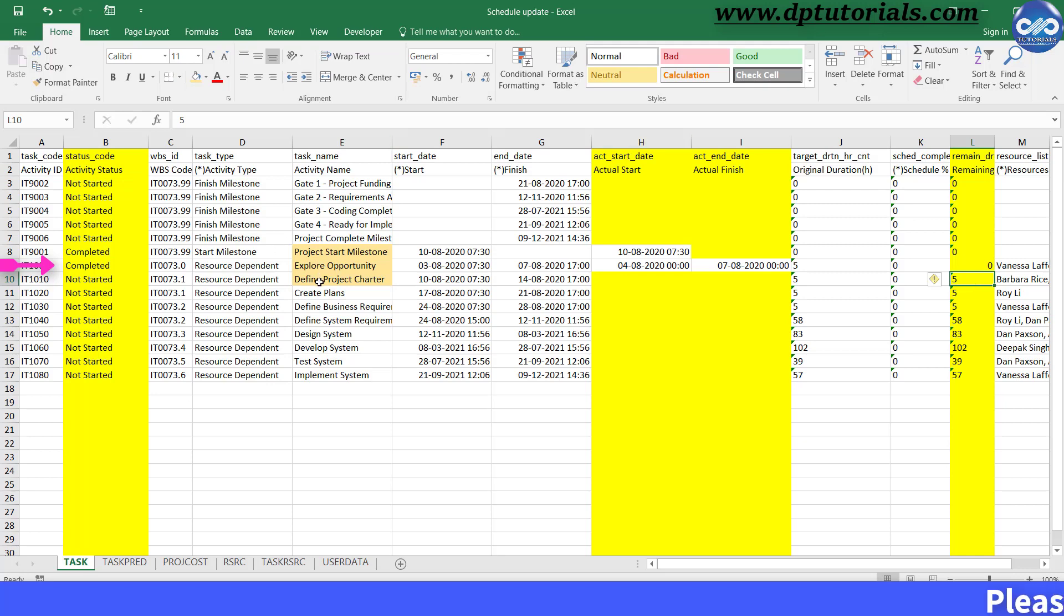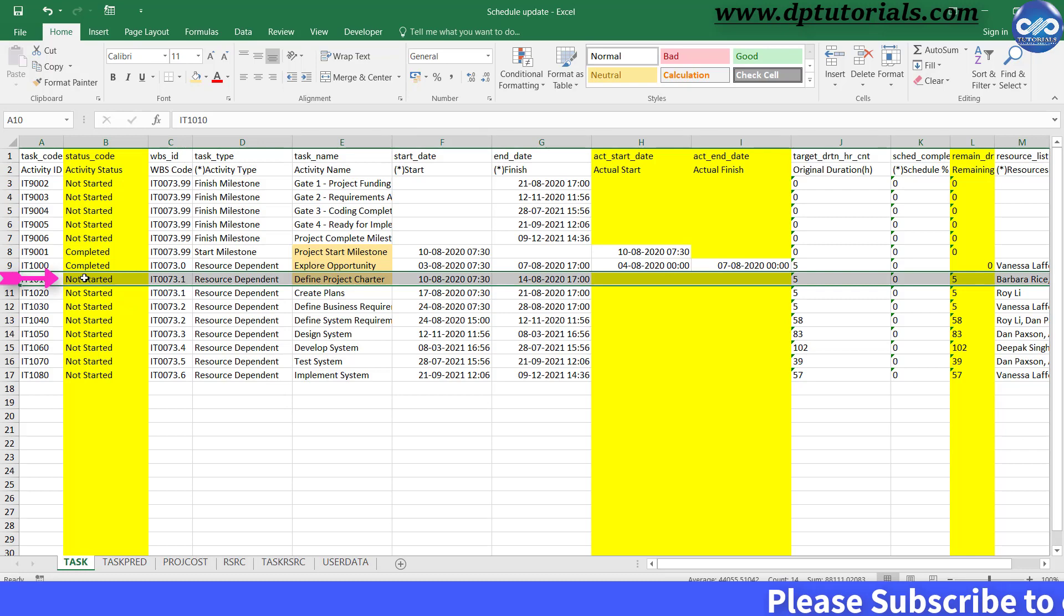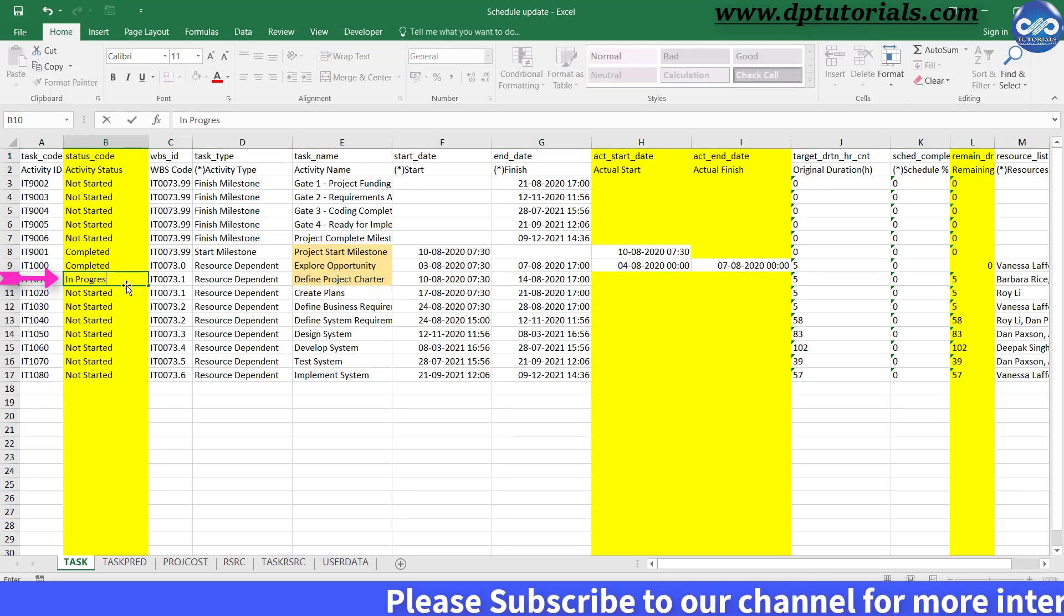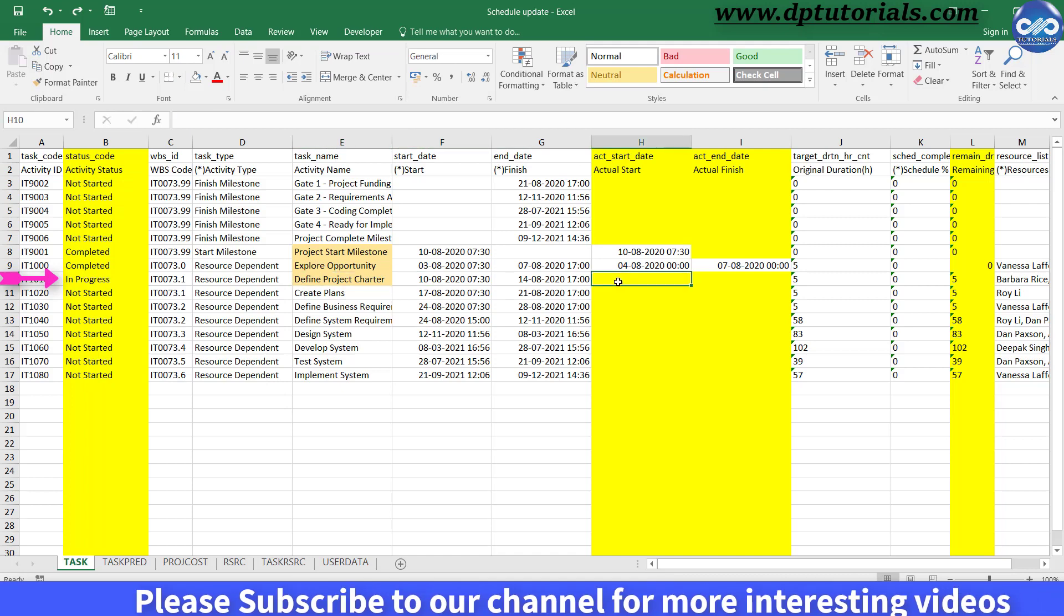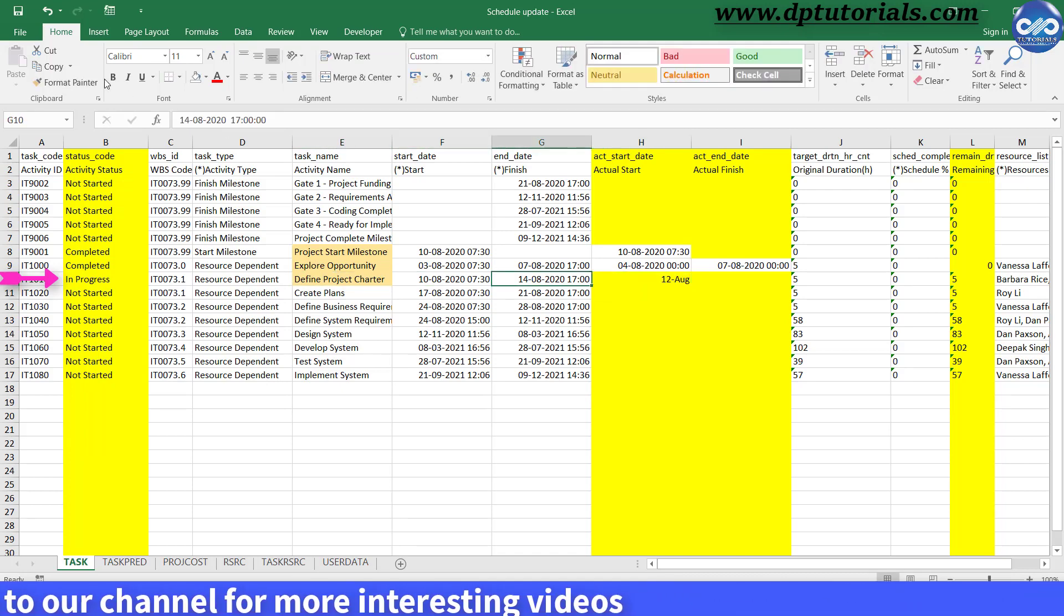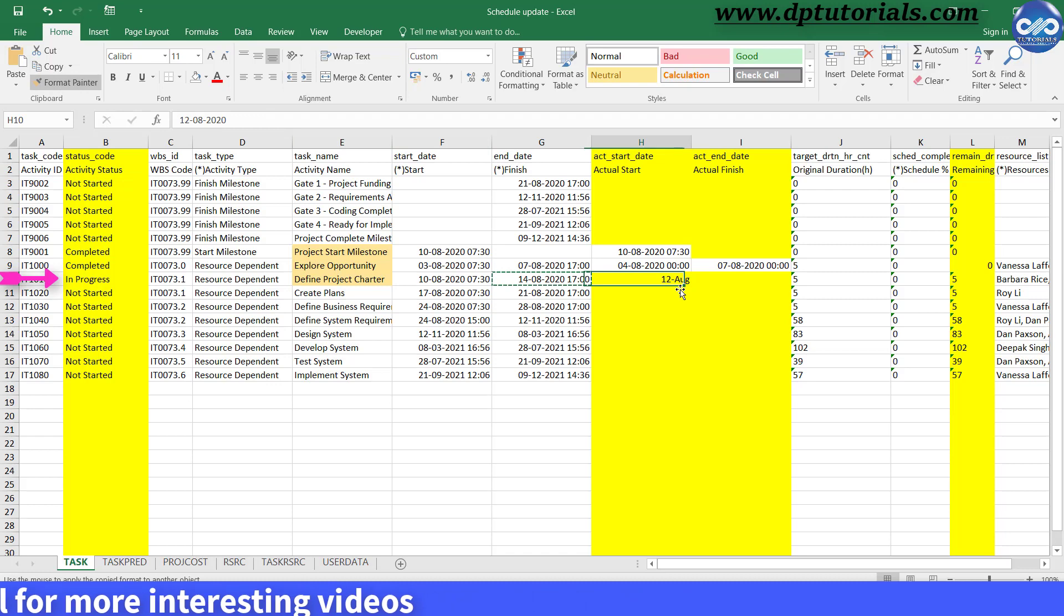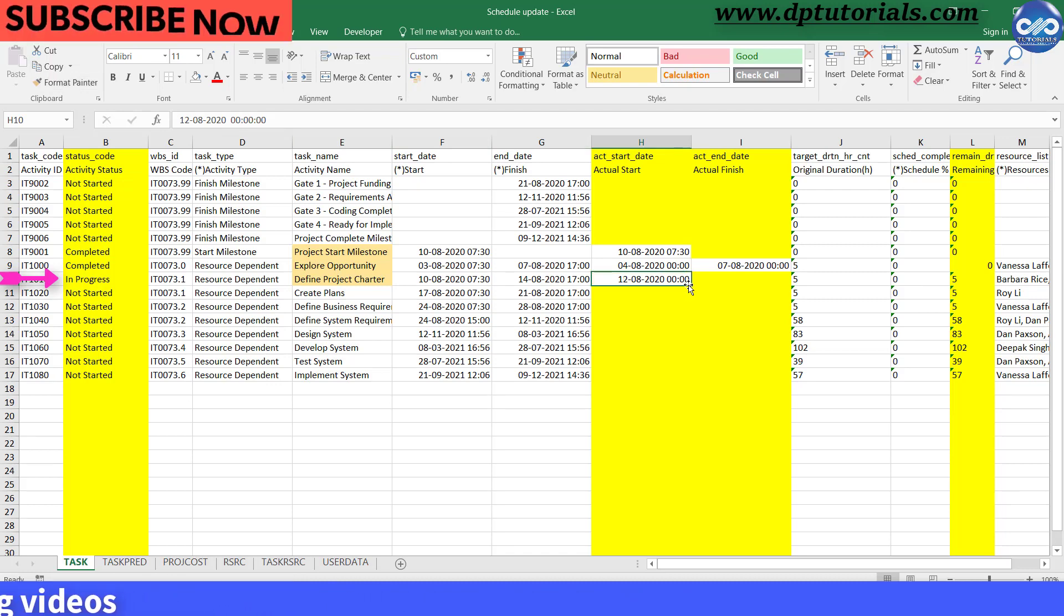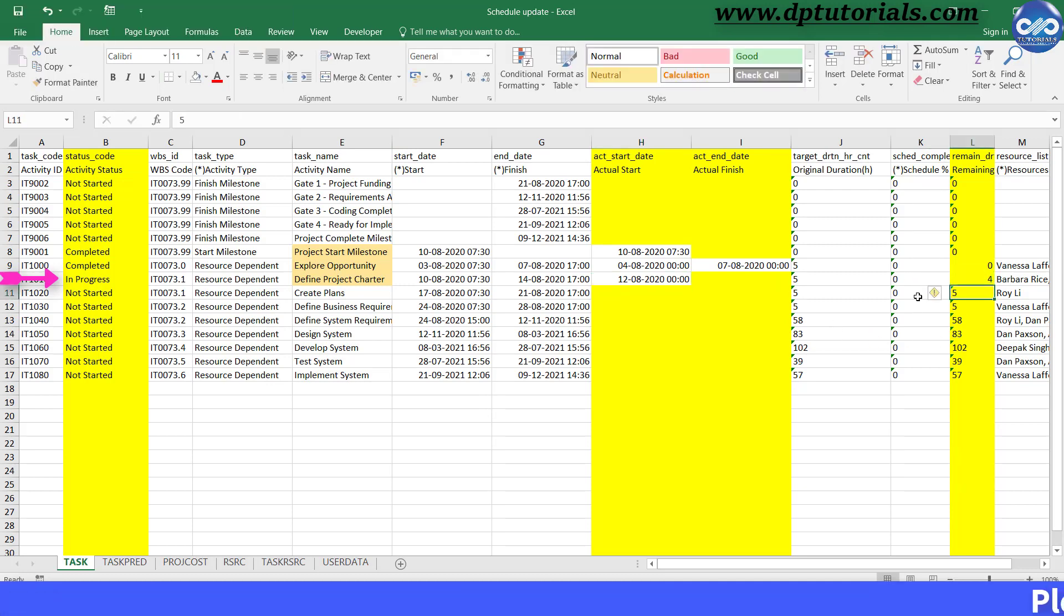Now go to the third activity, Define Project Charter. Here I am entering the Activity Status as In Progress. I will give the Actual Start as 12th August with the same format and will leave the Actual Finish as blank, as it is in progress, and the remaining duration as 4 days. Now we are done with the updating of schedule in terms of activities.